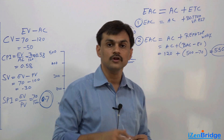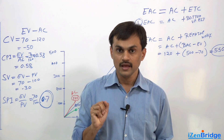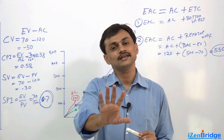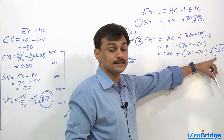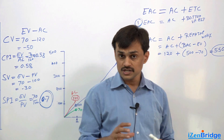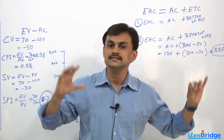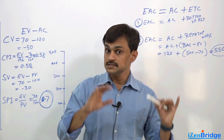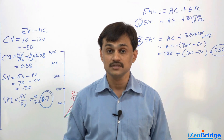Looking at this 550 dollars more closely: on day 1 we did 70 dollars worth of work but spent 120 dollars — meaning we spent 50 dollars extra. The approach here says just account for this 50 dollar overage and the rest of the work will proceed as per budget, which is why our estimate at completion became 550 dollars. This is the situation when your question shows that today's problem is a special-case scenario, not expected to occur again, and our original estimates still make good sense. We want to estimate our completion based on our previous estimates.